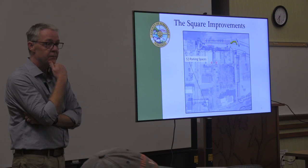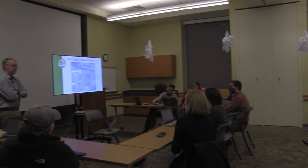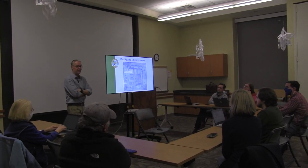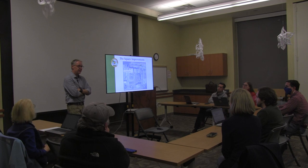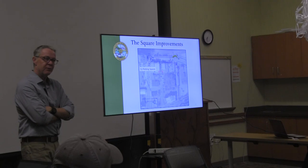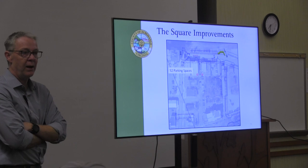Do you know if the contracts will have incentives for early completion? Will they have penalties for late completion? We put in all of our contracts language that calls for liquidated damages for delays if they're undue delays. So there are reasons why we would allow for some delays. Weather can be a significant delay. Occasionally on some sorts of projects where we have to do a lot of digging, and this will have some digging because of the stormwater element, we may hit rock.